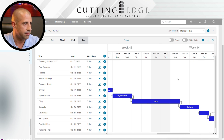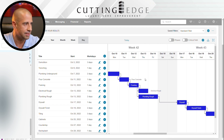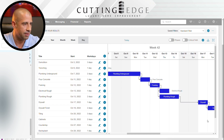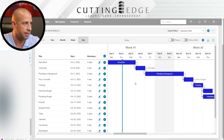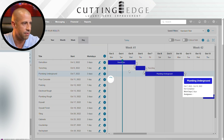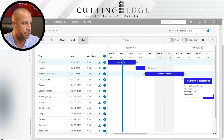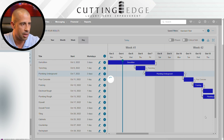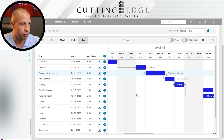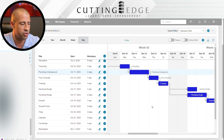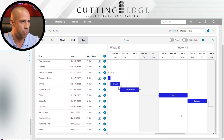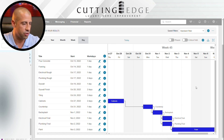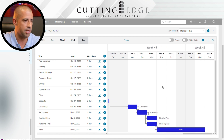Another great thing about having the schedule done at the beginning is: let's assume someone takes an extra day or two. Since I have everything linked together, if there's a delay on the project, when I move that activity two extra days, the whole schedule gets pushed back automatically. So I'm able to use my schedule to coordinate with the people working and make sure they go to the job site when I need them. This is a very important tool on any project in order to follow a sequence and manage your project correctly.